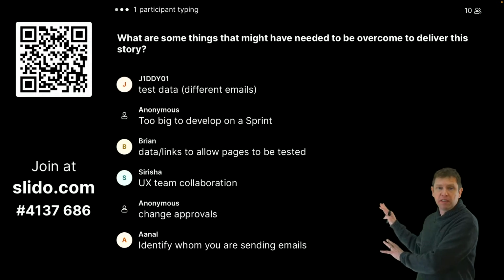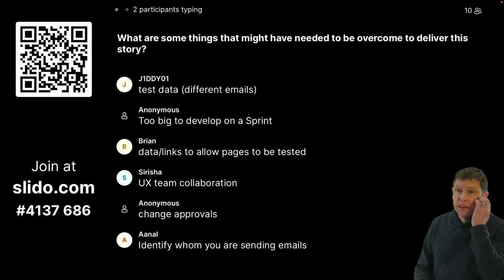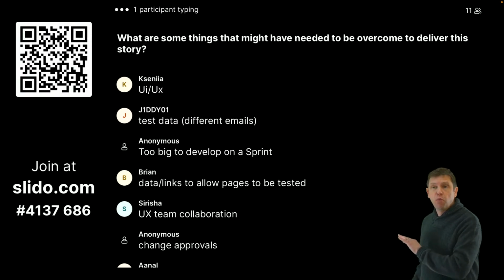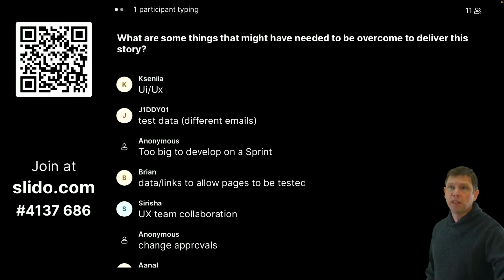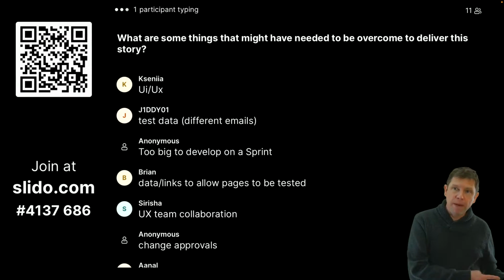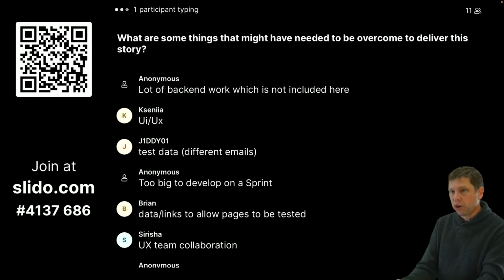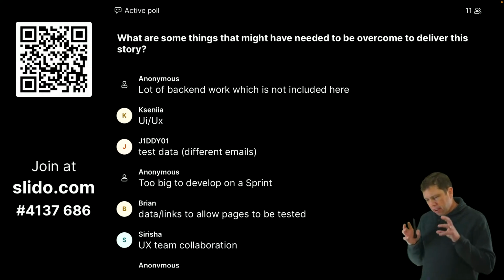And I may run into some of these things. I may start hitting those and decide we need to work on another story. We may get into this and decide that working on email first is going to take us 6 weeks to get worked out. Let's put this back on the back burner because we can't deliver that. Get the process started and then go ahead and start working on something else.